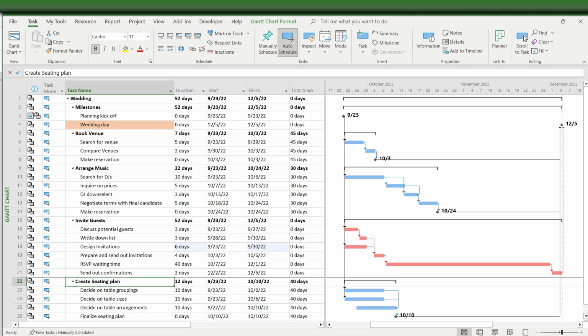We saw in a previous video that the critical path shows us the series of tasks that we should prioritize the most. But what about all the other work? How do we prioritize from there? Knowing which series of tasks have the lowest float values allows us to prioritize not only the critical path work, but all tasks in our schedule.